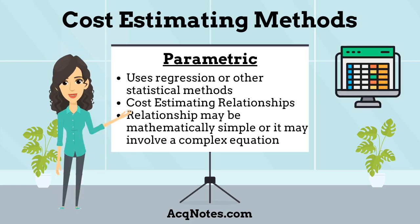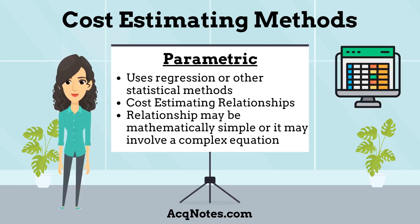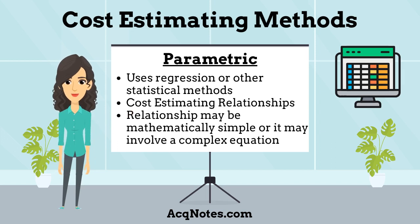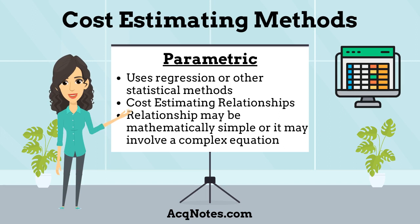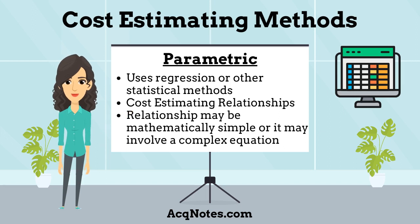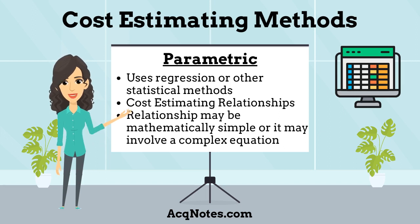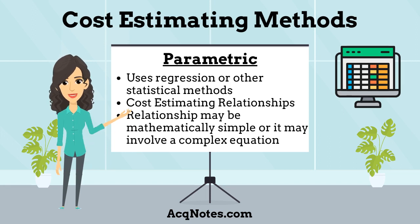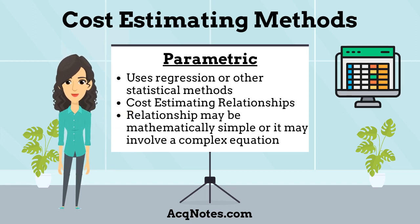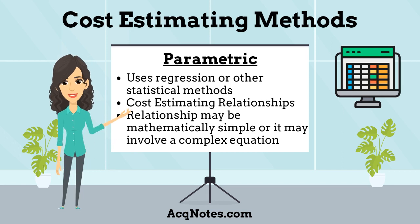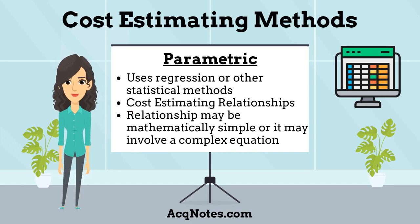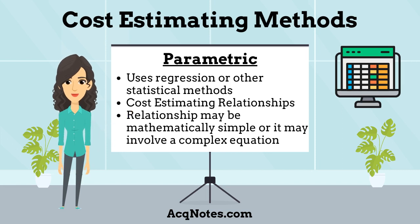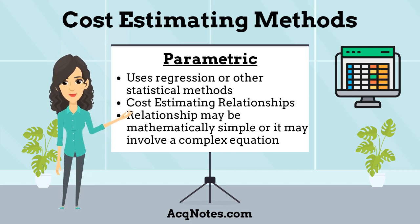The first method I will discuss is parametric cost estimating. The parametric method uses regression or other statistical methods to develop cost estimating relationships. A cost estimating relationship is an equation used to estimate a given cost element using an established relationship with one or more independent variables. The relationship may be mathematically simple or it may involve a complex equation, often derived from regression analysis of historical systems or subsystems.